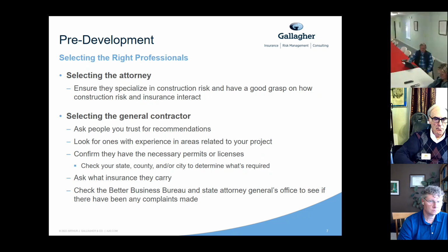And of course, you always have the option to go to, and I recommend doing so, even if it's a recommendation from a trusted colleague, that you check the Better Business Bureau as well as the state attorney general's office to make sure there's been no complaints made against the contractor. You want to make sure that their license is in good standing, that they have necessary permits to do the job. All of those things should just be standard and required during your general contractor selection process.